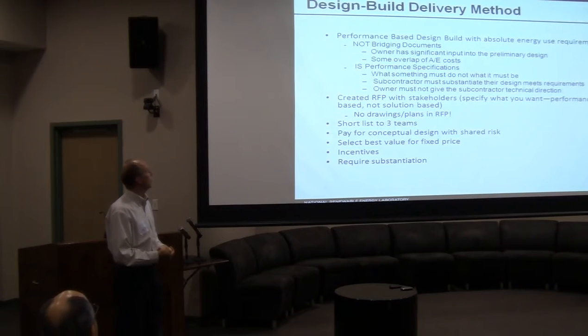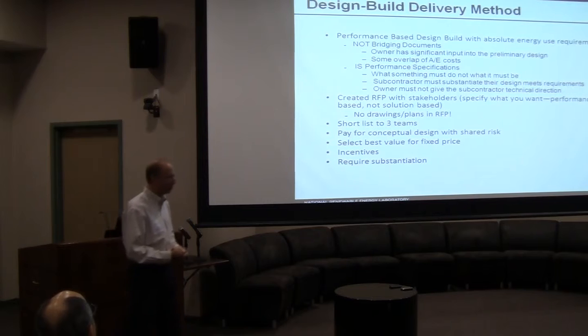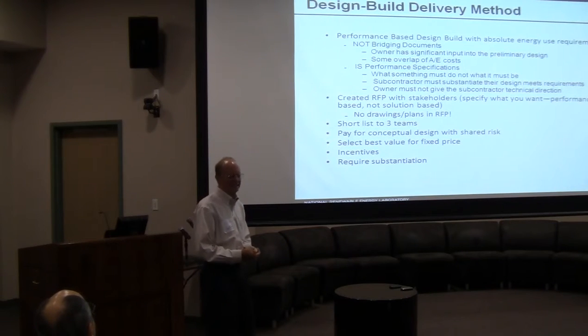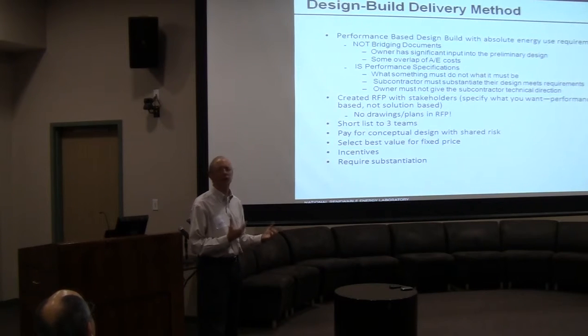Okay. Is there a maximum price that you would pay for the conceptual designs? So it was set up front. I want to say, $300,000 for that. I mean, it was fair, but the other part here was sharing risk. And so it was enough that we could get good answers, but it wasn't enough to probably fully pay, depending on how much their marketing machine wanted to take over.